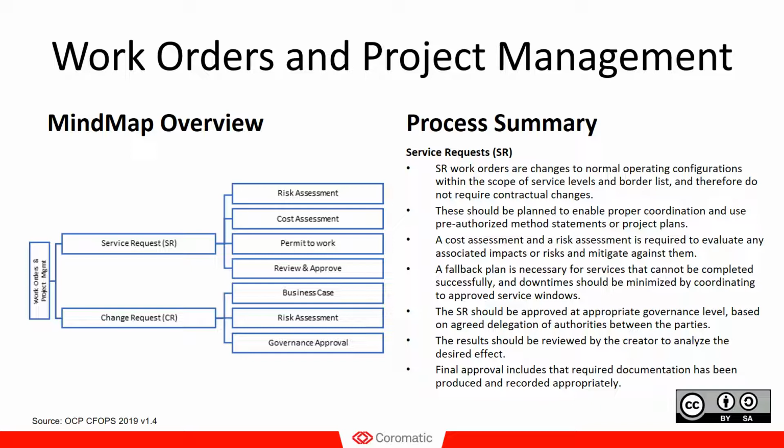A typical example is that if you have planned works on site and it needs to be performed within a certain time limit, how long do you need to be at a certain time point before you consider that this will not work and you have to backtrack and return to the previous state.